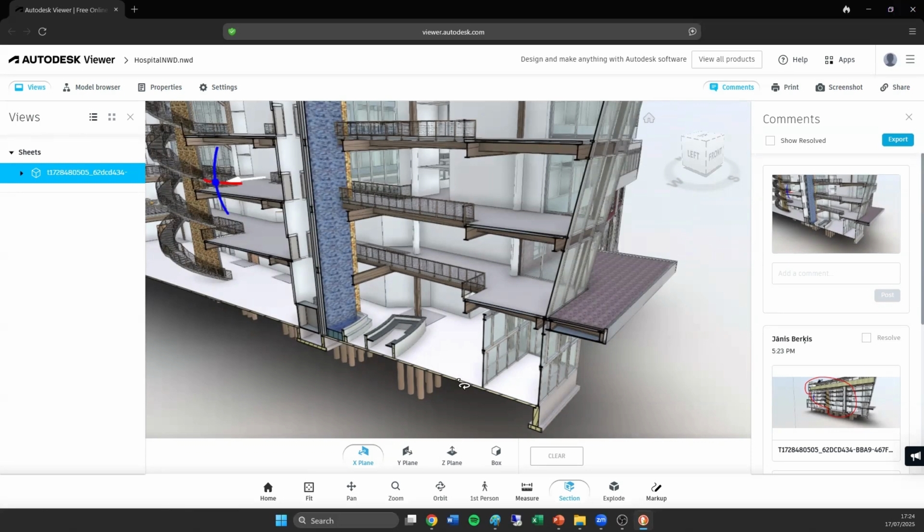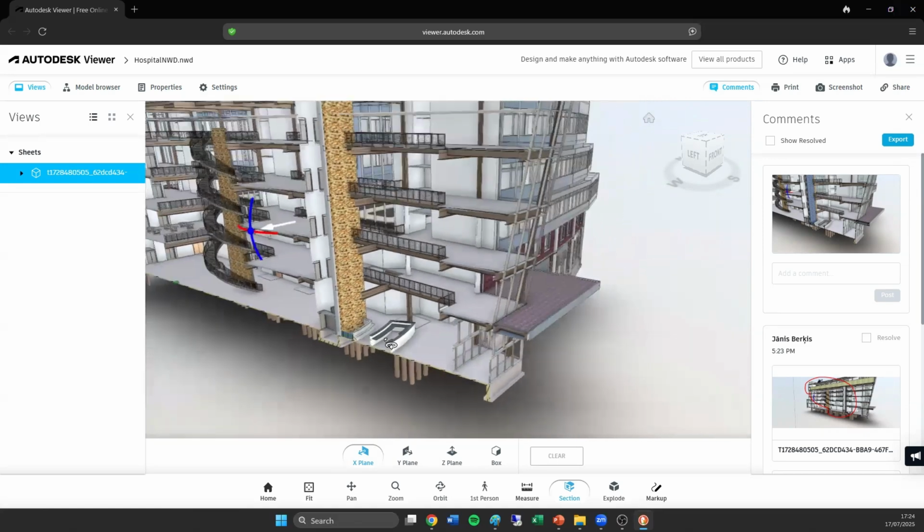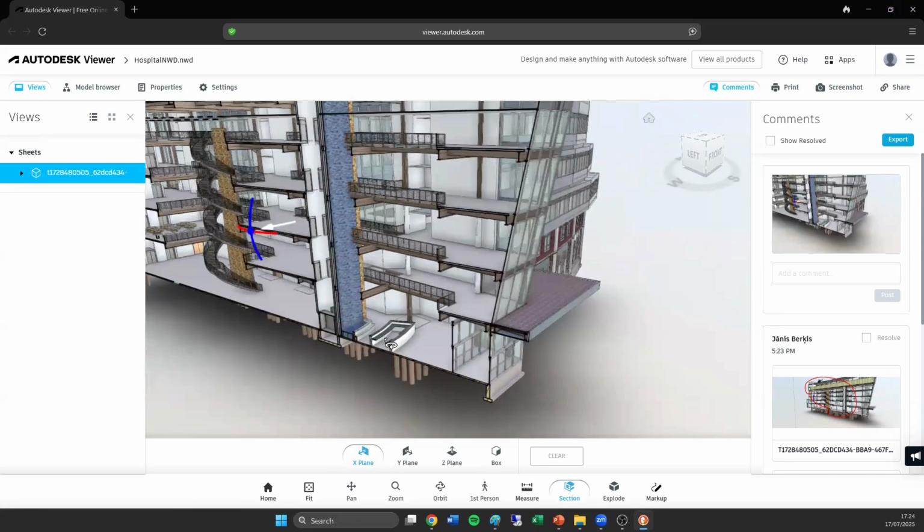We simply walked through the building and through every room, and the professionals sitting in this meeting were looking at the walkthrough and commenting on the different issues they saw, like technology issues, design issues, layout issues, etc. Then all this information was gathered into a list of comments, which were added to the responsible people for them to address those comments.